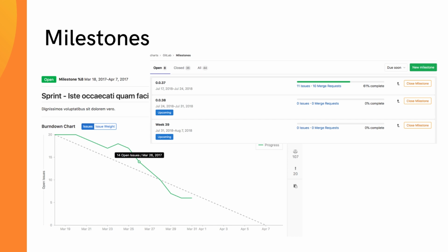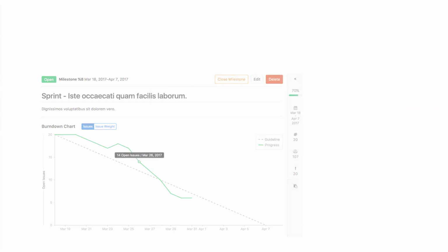I'm currently, like I said, using... Some people use them as sprints. You can do a sprint with the milestone. I've seen people use iterations. The downside of iterations is that it's doing just issues. So I'm doing weekly sprints, in a sense, or weekly iterations, using the iterations functionality, and then for my phases, which are like 4 to 5 of those iterations, I'm using milestones. And then again, when you get to roadmaps, you're able to lay across, and we'll look at it in one second.